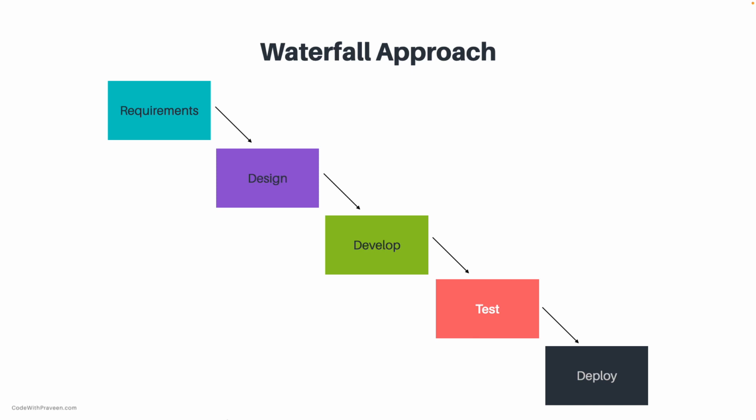For small teams and products, it might look good, but it comes with various limitations such as increased time to market, complexity in getting early feedback, difficulty in changing the requirements in the middle of the development, and various other reasons.